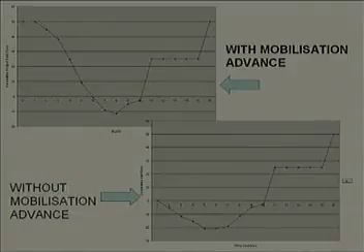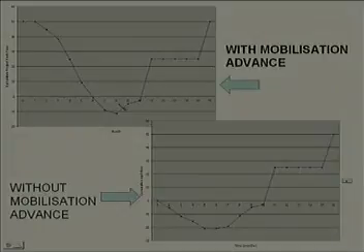What you are doing is taking the client's money itself to run your business, except for the short duration, in which, let us say for this problem from month 6 to 10, that means for about 4 months, you have a slight negative cash flow, and that you have to manage either through your own money or through some loans on which you have to pay interest charges. So, that is why you will find that mobilization advance has a major role to play as far as project cash flows are concerned.